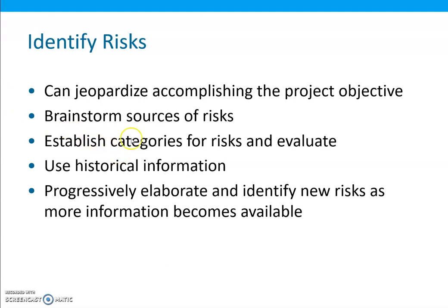The second category of risks is schedule risks. For example, vendor delay in delivery of critical equipment. The cost category includes material costs escalating more than anticipated. The human resources category includes, for example, may not have people available when required to staff the project. And then there is a category of